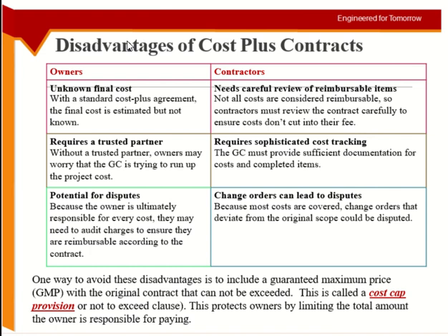For what? Now you know you have an office rent to give, you have electricity bills, you have subscriptions, you have blah blah blah. But how do I show it to the client? You see the point? So the client is just what? It's just your profit, right? So you have to justify it, you have to convince it, and so on. And obviously this cannot be built. You cannot say, this many units of electricity in my office, so this is for your project. It cannot happen. Okay? So this is the problem here.